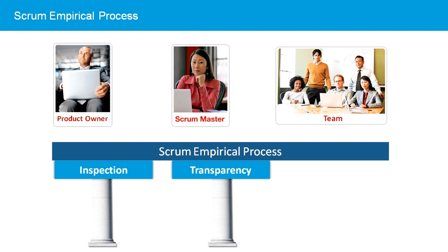Inspection means taking advantage of the transparency to observe each step of the process and critically evaluate how the project is progressing. This inspection is facilitated by the Scrum artifacts and meetings. The artifacts produced are used and inspected by the team and stakeholders daily to determine how the project is progressing. These same artifacts are also used in the Sprint Retrospective meeting. The Sprint Retrospective is a key meeting in which the entire Scrum team reviews their performance in the past sprint, discussing issues, their causes, and how processes can be adjusted to alleviate the issues in the future.